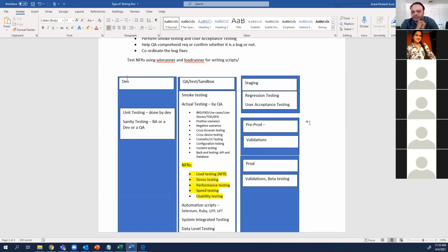That's an excellent question, Amit. So in product backlog, you prioritize epics and features. In sprint planning, you prioritize user stories. In defect review meetings, you prioritize defects. So prioritization is done at 3 different levels. Epics and features first in product backlog, then user stories in sprint planning, and then defects in defect review meetings. Fantastic. Thank you.